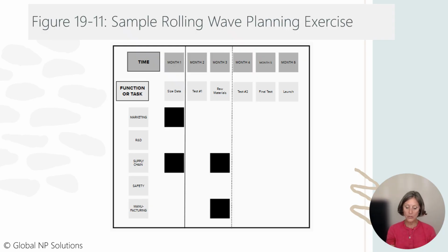In practice, time blocks are listed as weeks instead of months, and individual tasks are posted only for the short term. Ultimately, the rolling wave plan integrates with the project schedule and is updated during stand-up meetings. An individual sub-team Scrum board or Kanban board may be linked to a task or learning event shown as dark colored sticky notes in the figure.